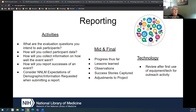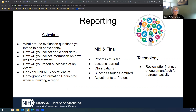Activity reports are the most reports you'll submit — one for every outreach activity or event you conduct. Your award might be for one health fair, giving you just one activity report, but if you're doing a series of classes, webinars, or community meetings, each one gets its own activity report. These are submitted within the month they are conducted, and they cover attendance, how the event went, whether you're tweaking anything for next time, and demographic information.